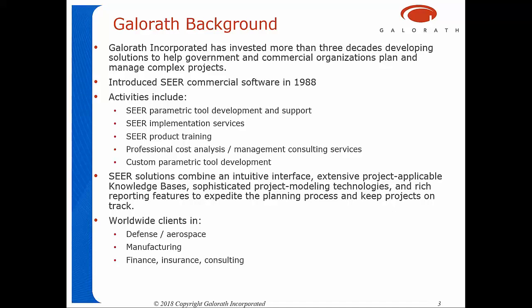Let's say another word about knowledge bases here for those of you who may not be real familiar with knowledge bases, but it's a quick way of getting the model up and running. You don't have to know everything, all the inputs to a project to actually get started on an estimate. As long as you know basically what it is we're doing here, are we estimating a battery or some optics or spacecraft structure or an airplane or a ship. You tell the model what your application is. You tell it how you plan to acquire the thing that you're estimating.